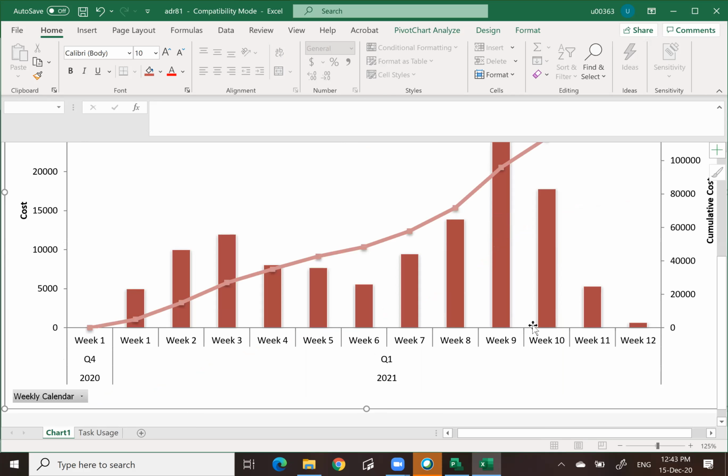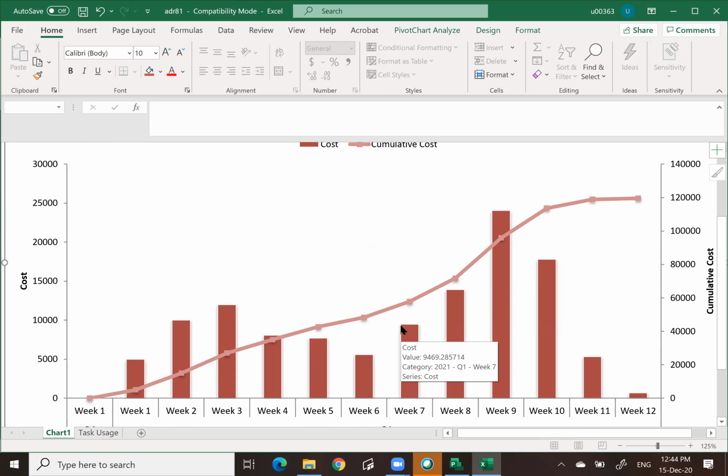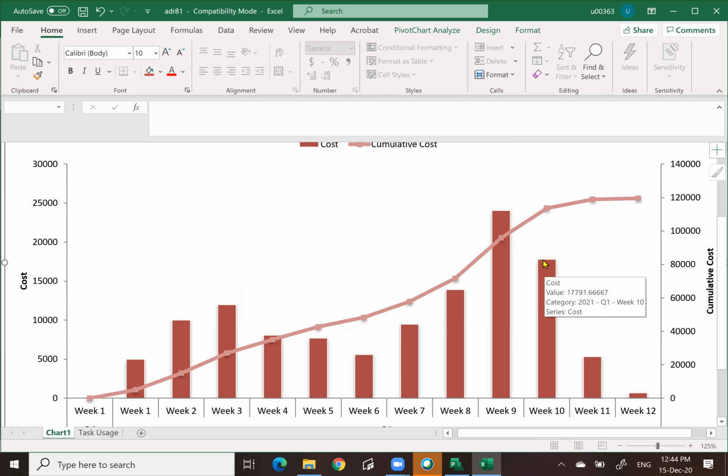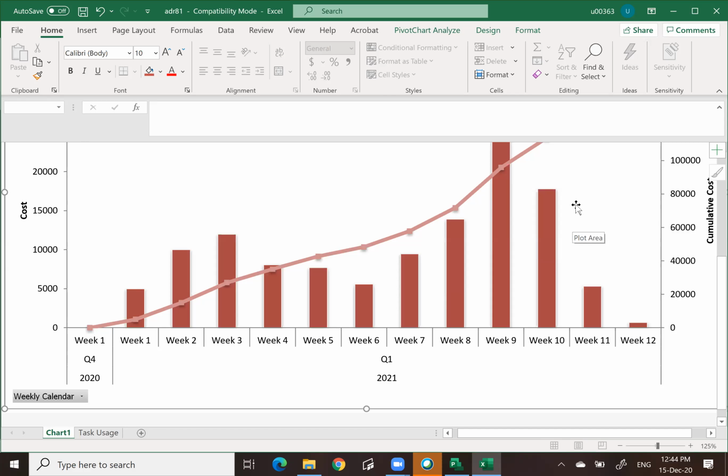Now, because we start our project on 1st January, so 1st January basically starts on week number 1, and then you notice that the graph will be drawn. This is like an S-curve. It might not look nice because it depends on the data that we input. If you input more activities, more data, then the S-curve would look nice, okay? But this is what the S-curve is all about, that we use in the construction industry: the cumulative financial values. Every week, how much we should spend.